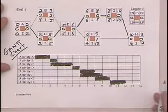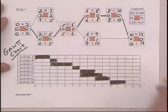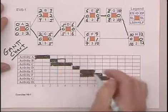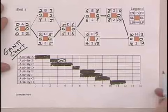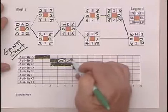And then the last thing you want to do is identify where the slack is. So for example, B has one day of slack and typically you indicate it like that. Sometimes you can put an X in it if you want to indicate slack, just be consistent. And we have actually two days of slack so we want to put two X's there.